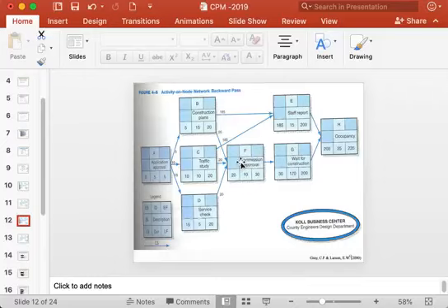You must take the smallest one of the following activities. You have two following activities here, E and F. E has 185 and F has 20. So you have to take the smallest one. The smallest among these two is 20, so you have to take 20 here.